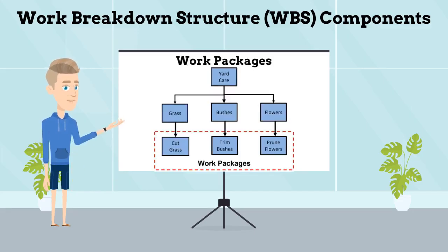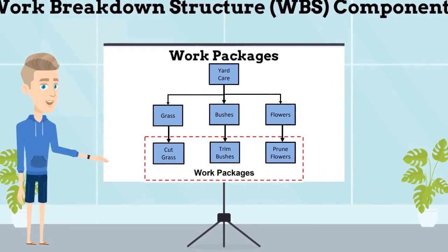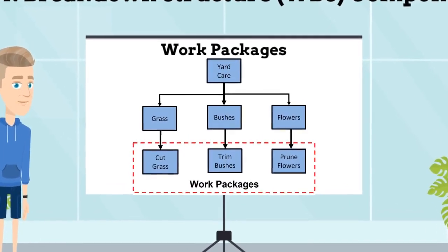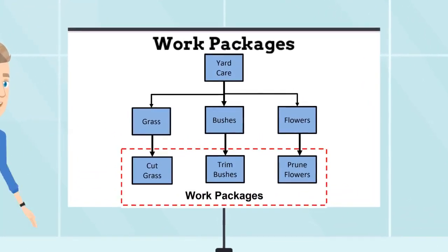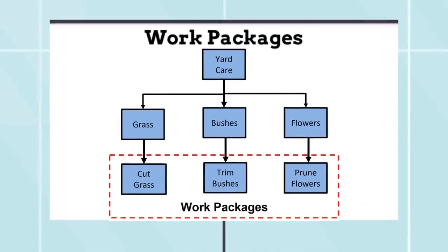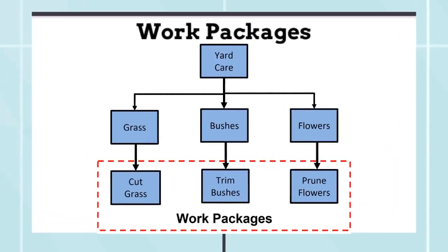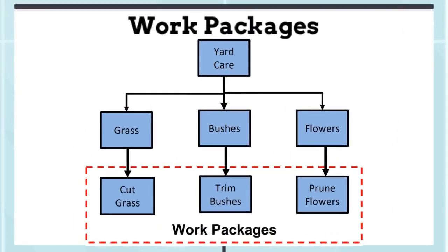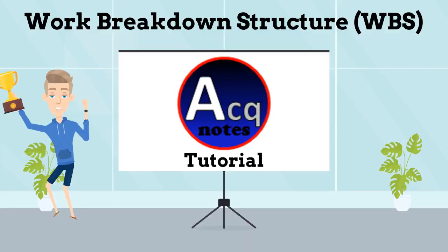A work package is simply a task/activity or grouping of work and is the point at which work is planned, progress is measured, and earned value is computed. It can be translated into different terms in different companies and functions. It can be a design job, a tool design package, a build-to-package, a shop order, a part number, a purchase order, or any other definable task/activity at whatever level of control is normal for program management within the company. A work package normally represents the lowest level of a WBS.